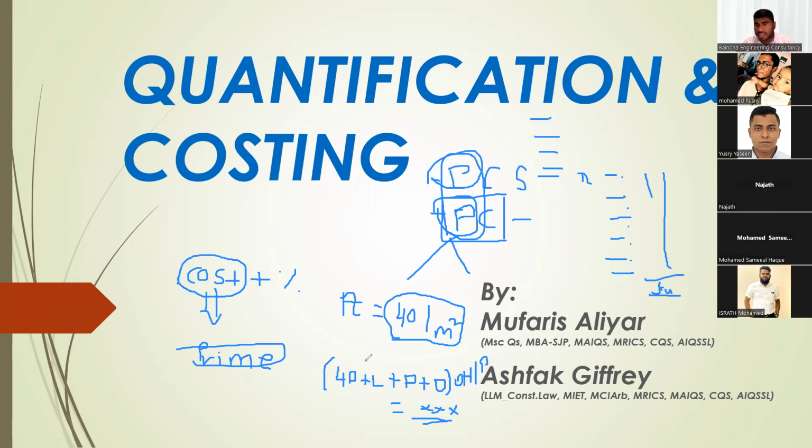So what is the engineer's duty? The engineer has to find the material in the market within 40 dirham per square meter. Then he needs to advise the client, and bring many samples. For example, he goes to a tile shop or tile supplier, and tells the supplier, I have a client who needs material for 40 dirham. This is his expectation. This is the color, travertine color, and this is the thickness needed. So the tile supplier would say, okay, I have samples in different colors, I will give you, then you go and talk to the designer, sorry, the client. So he will take all the samples and go to the client.